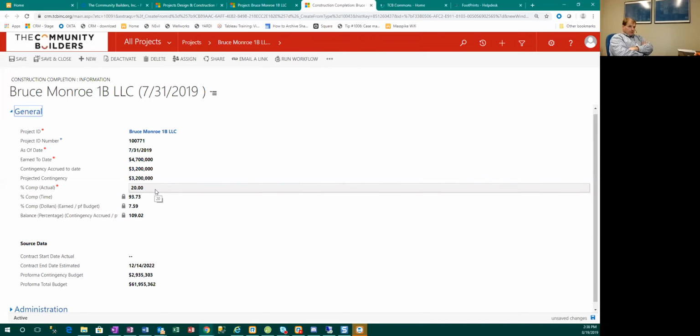You've only billed 5% against the project, only 5% of the time expended, but you're suggesting that it's 20% complete. That's going to flag as an inconsistency, right? We've got data that seems corrupt. I've got my professional opinion saying I think it's 20%, but all the data is suggesting 5% complete.